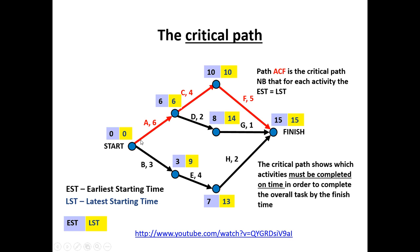We see that in each of these cases, the earlier starting time is equal to the later starting time. The zero, zero, the six, the six, the ten, the ten, the fifteen, the fifteen. There is no room to be delayed. I couldn't delay activity A, C or F without impacting on the final completion time.